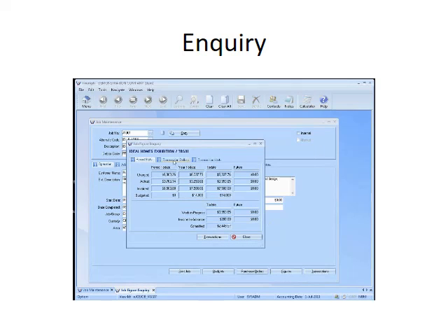If I look at the details under the transaction dollars, it will look at this job and say for my labour, subcontract, materials, purchase overhead, how much of those different functions I had for the month, the year, the job, and into next period, and totals. If I click on units, it gives me the same information but by the quantity. So really, for a lot of people, it's the number of hours they've charged under labour, and the number of hours I've had of subcontract is quite key for reporting.